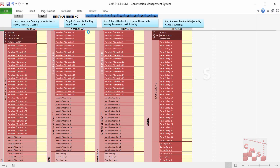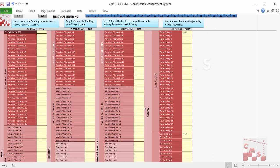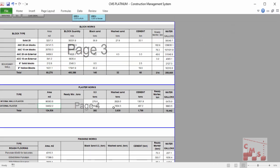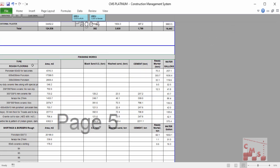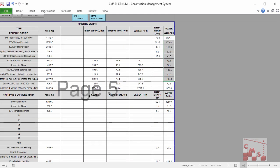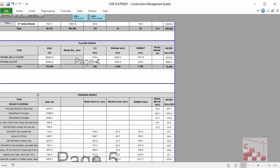Still in quantity surveying, the same can be done for finishing work. For any internal location, we insert only the type of finishing from AutoCAD and CMS gives the required quantities directly for plastering, flooring, skirting, and ceiling with all types. This information is also reflected directly in the quantities takeoff — all types of finishing, flooring, skirting, all quantities required, all required material whether ready material, ready mortar, or site-mixed mortar with sand and cement, even the water required for such work, and all internal wall details.